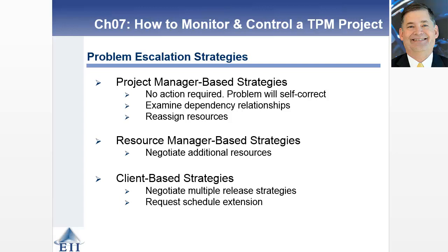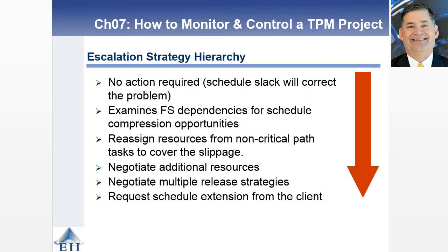The project manager intervened and reassigned resources the first time around, during the first intervention. During the second intervention, they negotiated additional resources coming in to work on the particular project. And I haven't discussed this yet, but as a client, I reduced scope and I extended the time associated with the project. What ended up is a very happy client and a project team that is looking forward to doing additional business with us by making this kind of strategic investment in this particular account.